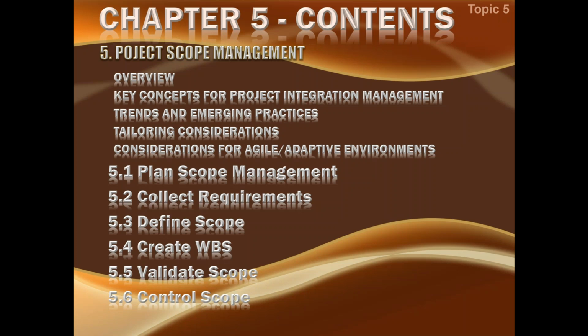Then the scope statement we create in 5.3. This scope statement is the major output of Define Scope. There might be many inputs and outputs, but we are concerned over here about the major output. What is the major thing coming out of it? The major output is the scope statement, and this is really a major output because it is also part of the scope baseline which we will be creating at the end of 5.4, Create WBS.